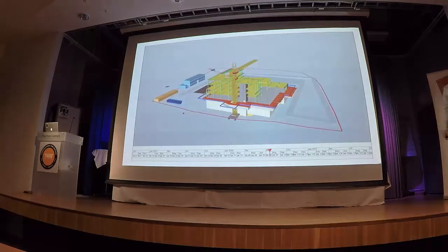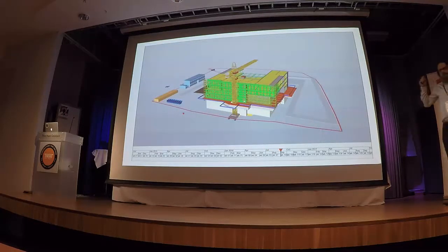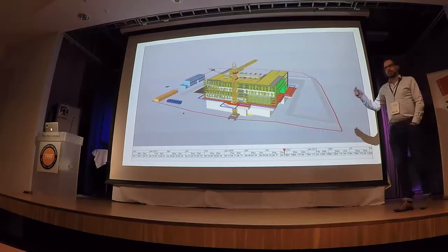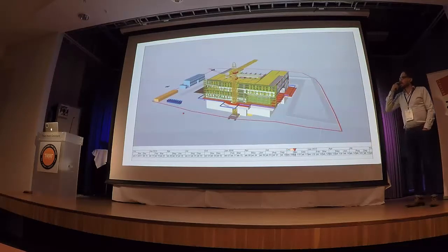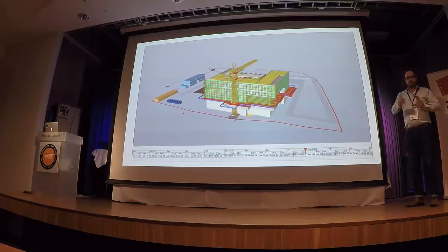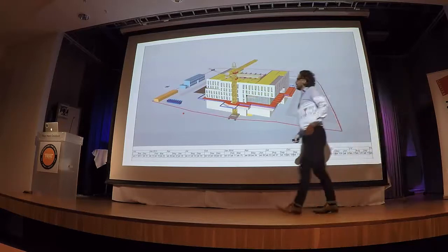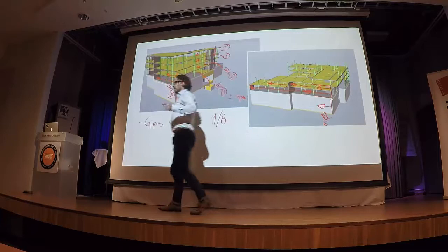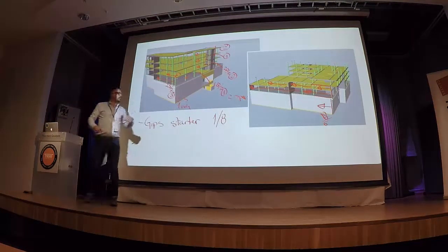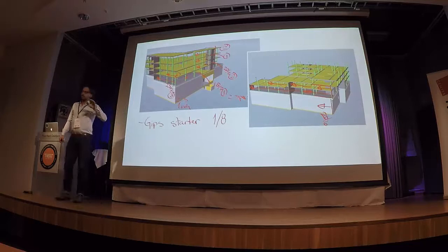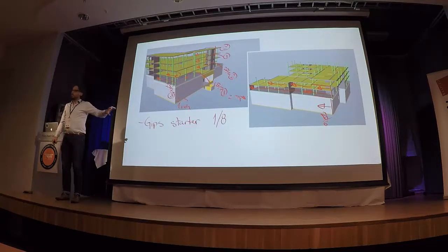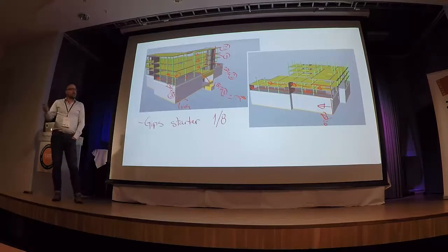but we will. As another example, it was used in a meeting trying to reduce the schedule for the facade to come in earlier. This is the same schedule that the entire project team put together in collaborative planning. Everyone believed in it. This is the best plan. Facade started complaining we need to get in earlier. We played the movie, and together with the team, we suddenly noticed that the facade is free 1 month earlier than expected. So again, a very easy way to make use of the 4D model.